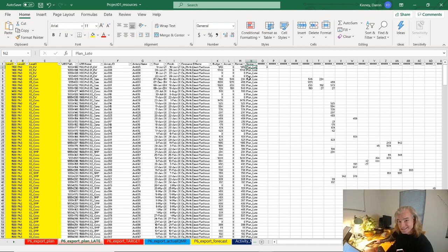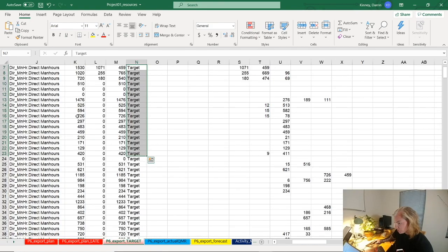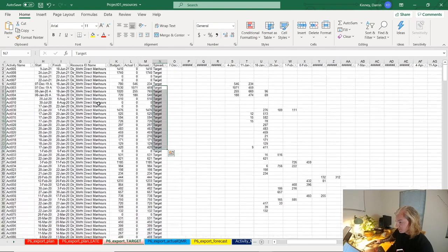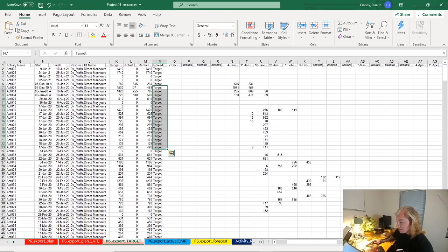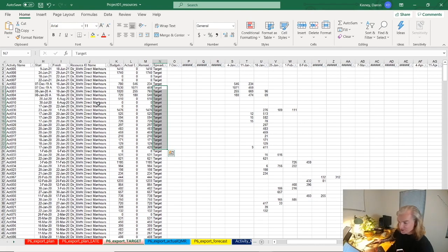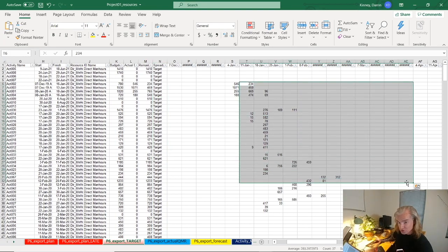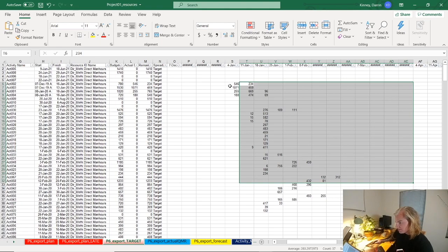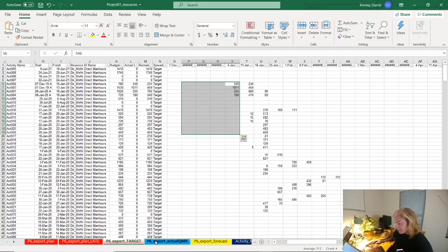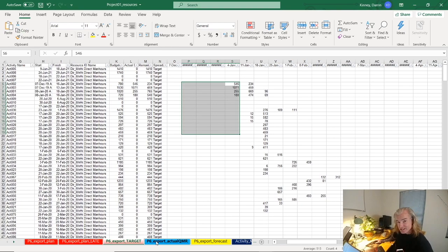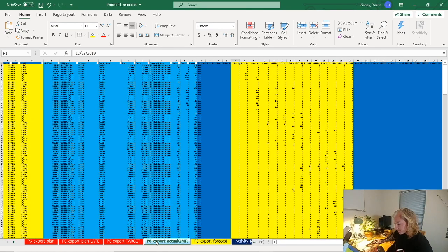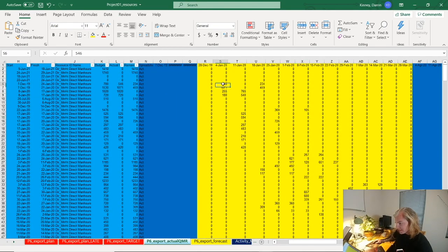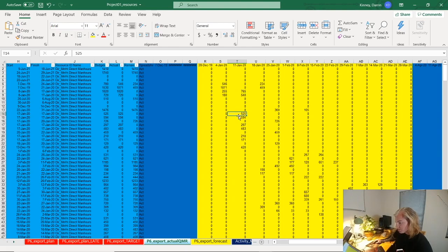It's called plan late - this would be using remaining late units from your resource assignments. Target is just a cut from any particular schedule you might want to call target. Same idea - just remaining early if you want target early, remaining late. And you will have to insert actuals to date. Now actuals to date are a little bit difficult because Primavera does not capture actuals very well.